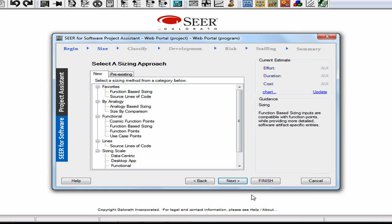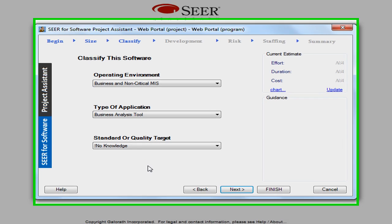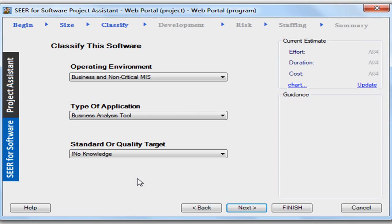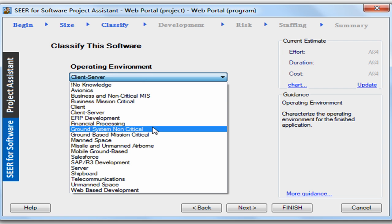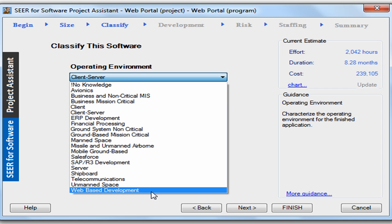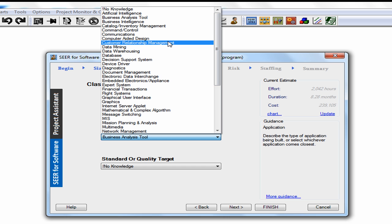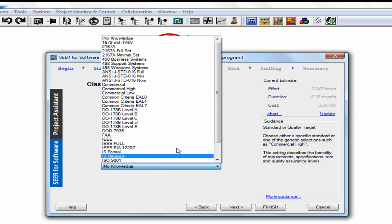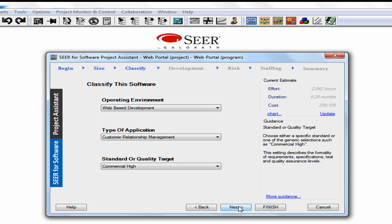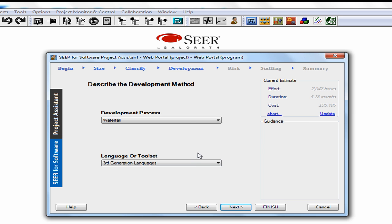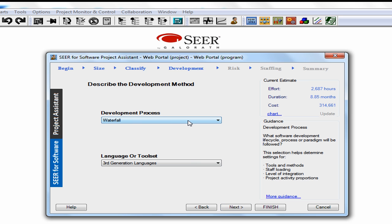Now that we've sized the software, we can use the next three knowledge bases to classify our software. For the operating environment or platform, we'll be building the software for this estimate — let's use web-based development. For the type of application, let's assume customer relationship management tool. For the standard or quality target, choose commercial high. I'll click Next.